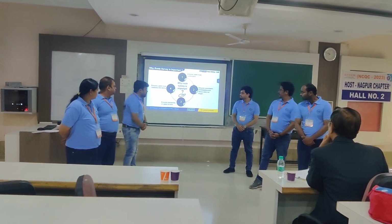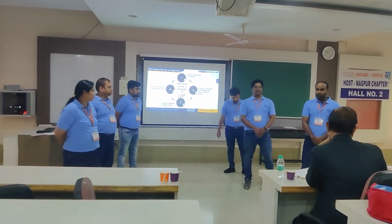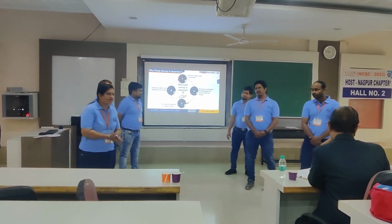So friends, why is root survey important? Because it ensures cable load correctness. It ensures correctness of templating, hence cable cut length. It ensures cable on time. It ensures cable route readiness for laying.